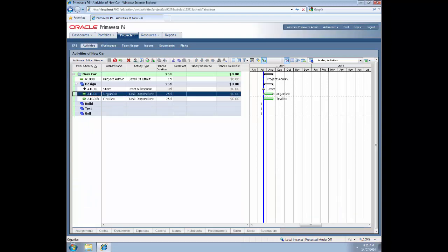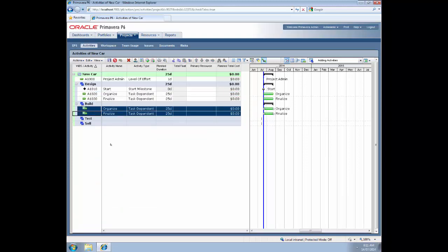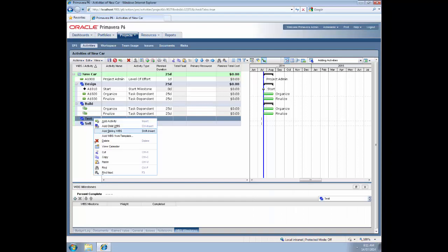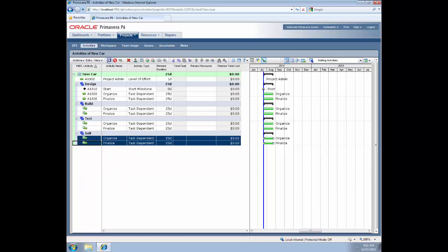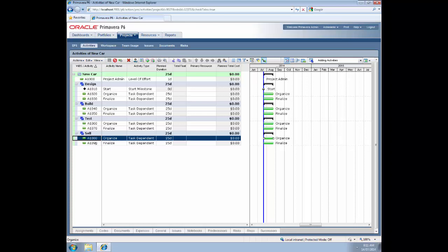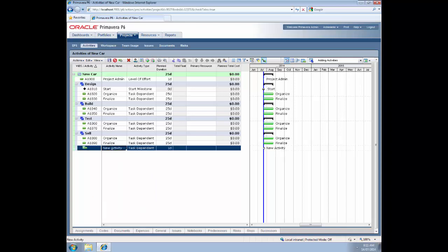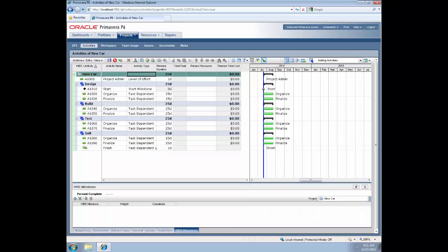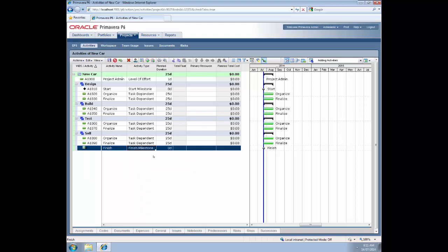I'm going to use these two generic activities - organize and finalize - on each of the WBS, so I'm going to copy them from there and paste them into the others. Save those, numbering's good. Then we add our final activity for this example, which will be the finish milestone. We change the activity type to finish milestone and save that.